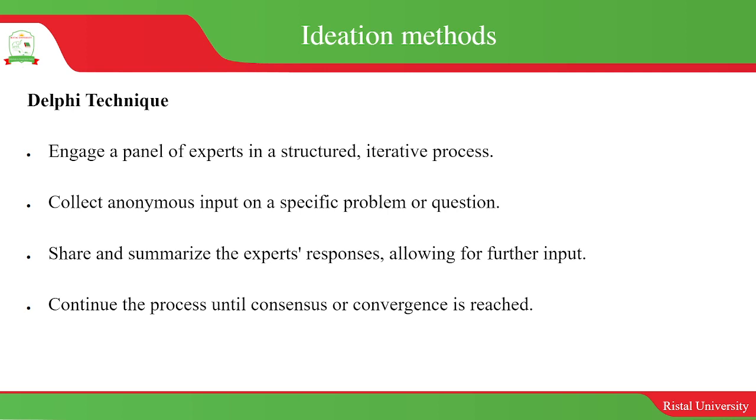If you have 5 experts, you can tell them to list 3 solutions to the problem. Now, when they send their responses, you compile and then see how the 3 ideas from each of the 5 experts are matching. Which is the most proposed idea? And then by your analysis, you will choose the idea that the experts have narrowed on. So by consensus, this is what they agree upon.